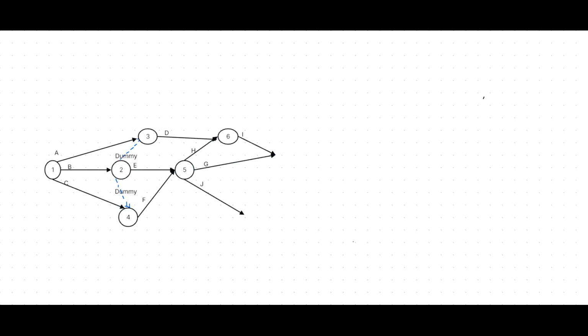With a situation like that, just skip K for a moment and give priority to the next activity, L. L we can start after completing J. Now, I would like to start L after completing J. J already started. Then using another circle, event number 7, we are going to say complete J. Then we can start L. Now consider the previous one.